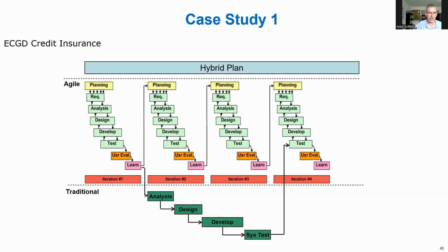I was working for IBM at the time. We had the contract to implement the new insurance system. And we used an Agile approach for all of the screens and reports. And then we had a separate sub-team for that calculation engine. It was non-negotiable, right? We had this 200-page specification that needed to be implemented and then plugged into this particular screen or whatever. And it worked really well by having these two teams working in parallel.